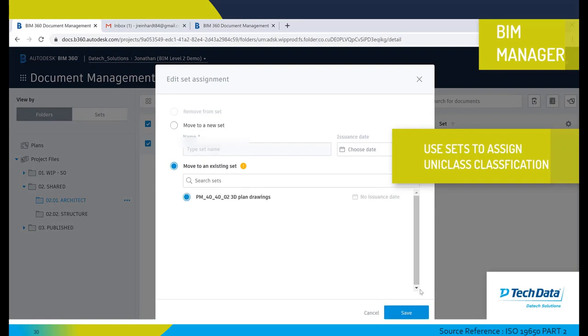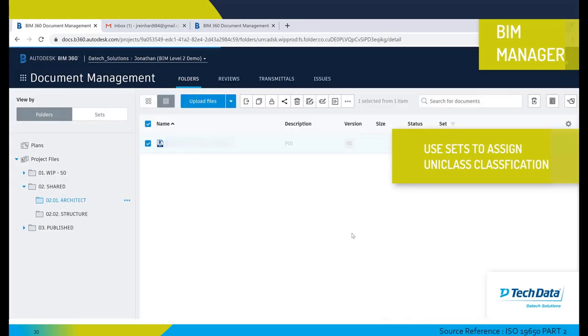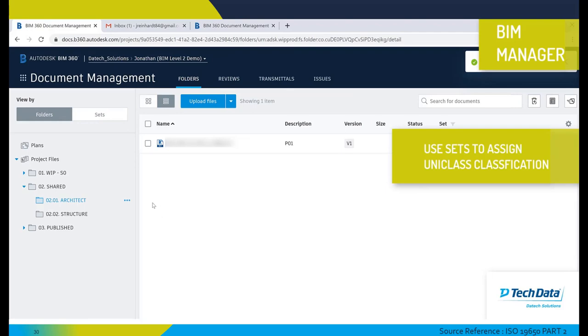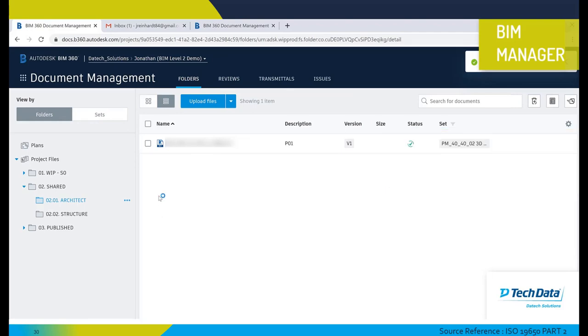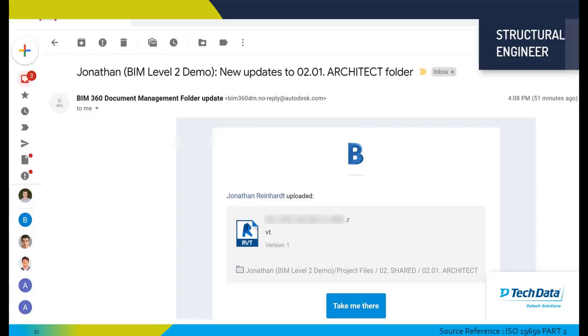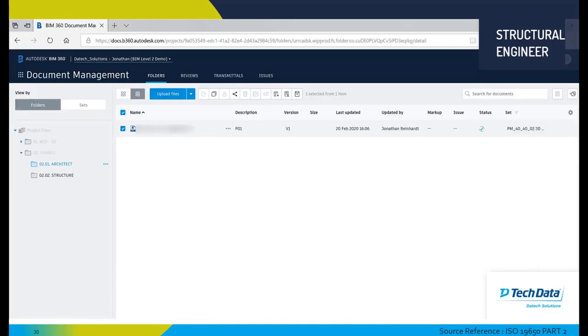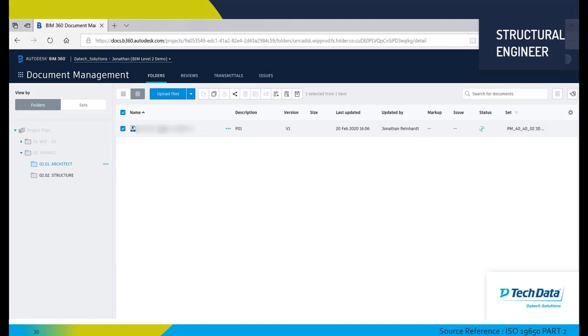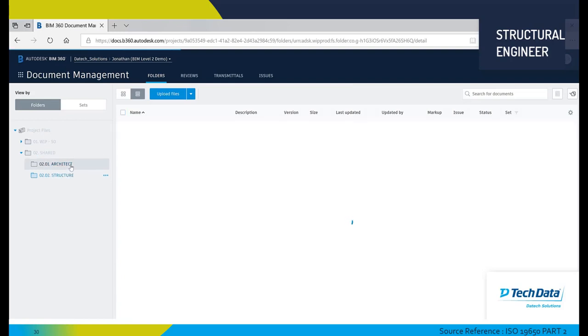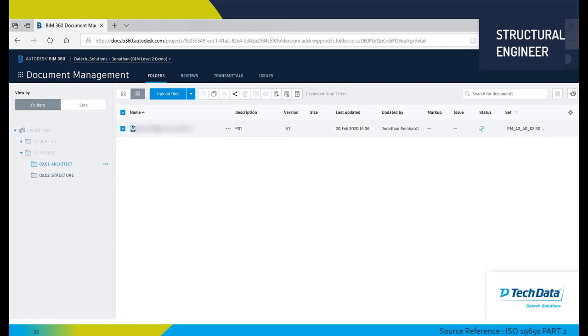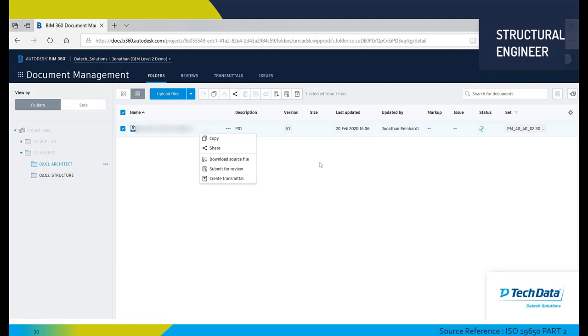Using sets we can then create the classification codes using UniClass format, and the BIM manager assigns this. Now the structural engineer has received an email to say that a file has been updated to the shared area. The structural engineer can now review this particular model, linking it into their own Revit model or whatever method that they're going to model their own structural elements around this particular architectural model.